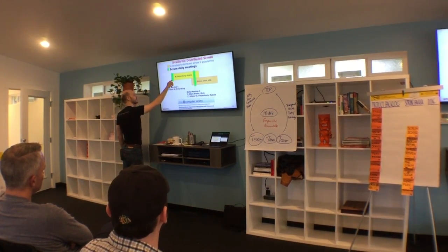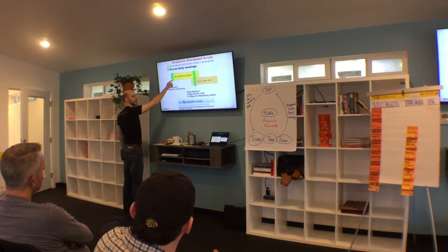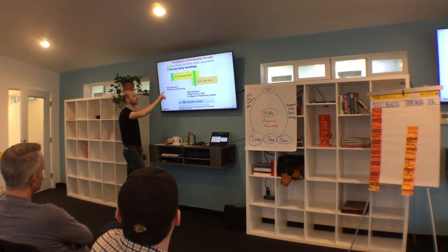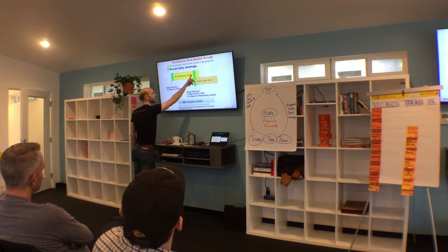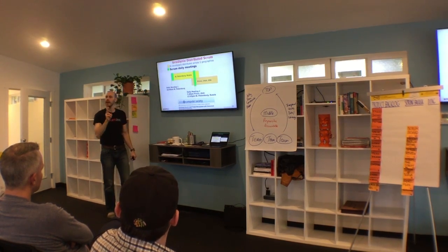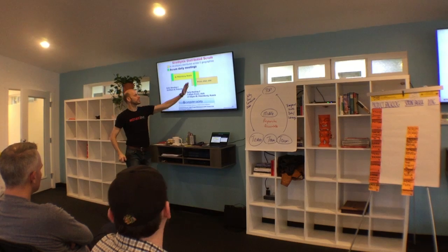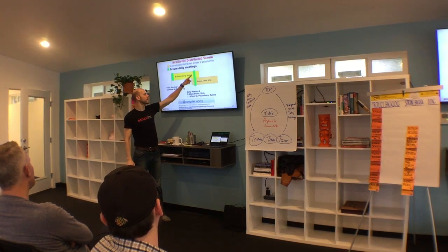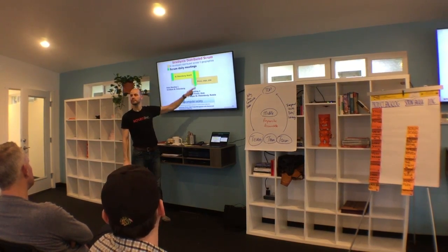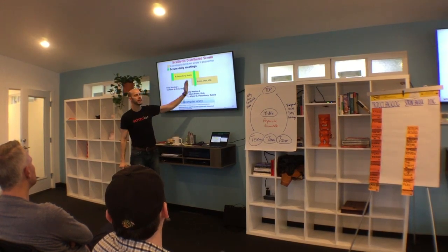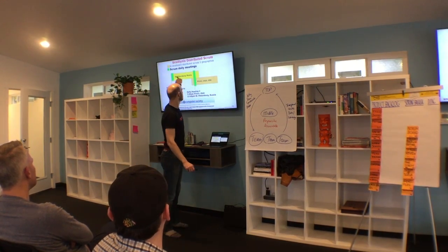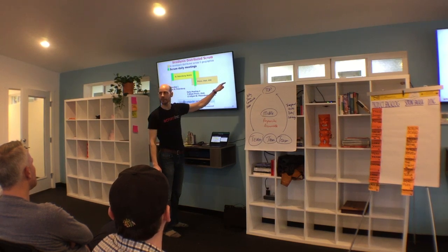In St. Petersburg, at the start of their day, they had daily stand-up, just like you folks just did. And then near the end of their day, they had a second daily stand-up every day. And that was the start of the day for the Provo, Utah team, and they did this through video chat. So they would have 2 daily stand-ups to create rolling teams. Now these people are members of the same team.